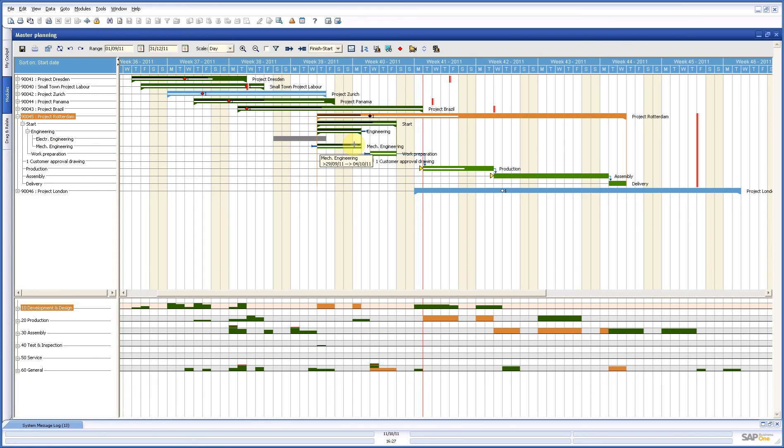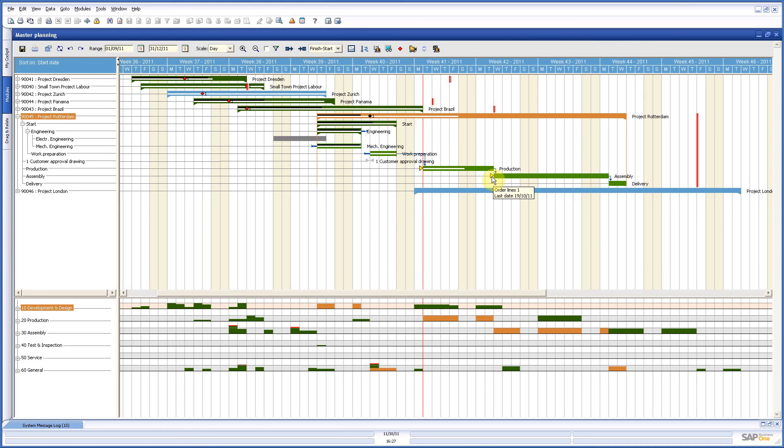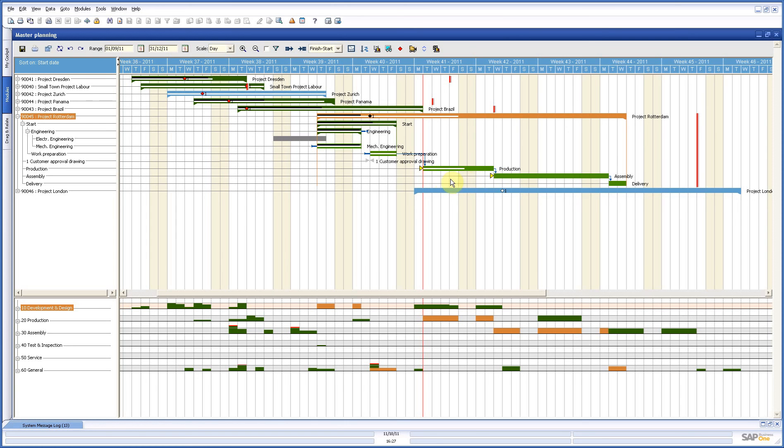Another thing I see is that I have here and here yellow triangles instead of white. And these yellow triangles means, you can see here that I have order lines and no more needs. So everything for my project is in. If I wouldn't have everything here, you would also see the white triangle of the material need as well. So only the yellow ones is that everything is in.